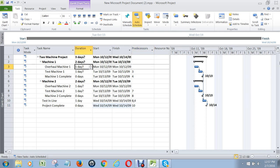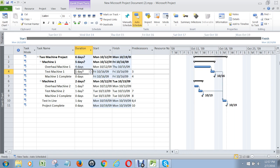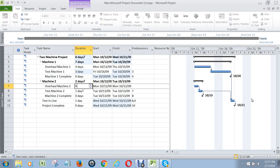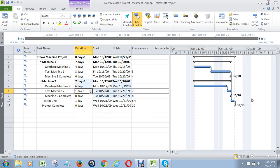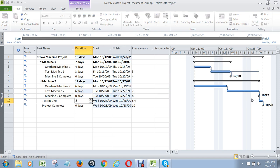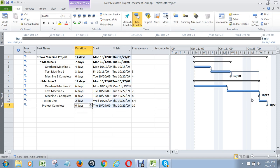So let's just give some numbers here — we would have gotten this from the project team. Let's say it takes four days to overhaul machine 1, and three days to test it. See how that lengthened the bars over here? And then let's say overhauling machine 2 is a much more involved process: it takes six days to overhaul it, and another six days to test it. And then to test in line is two days.